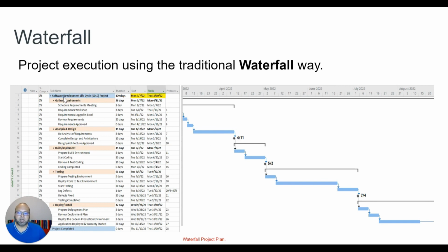On the left, you can see a typical Microsoft project plan that gathers the requirements and puts them into activities or the work breakdown structures that have their duration. We talked about duration versus effort. That has a start date, end date, and also links each of those tasks which are dependent on each other. So if you make a small change here, from 3 days to 5 days, everything moves up by 2 more days.